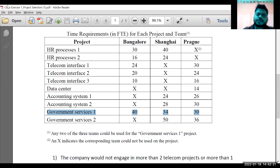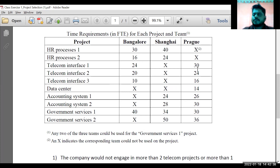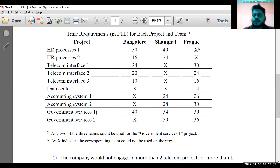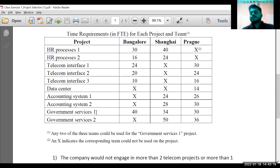The data center is a project where only one team is working — the product team — no other team can work there. Other projects generally have two teams. The comment services project is the only one with three teams listed, but it is written clearly that any two of the three teams could be used. So I can start this project with 40+34, or 34+30, or 30+40 — different combinations. It is not necessary to use all three teams. I can go with Bangalore and Shanghai, Shanghai and Prague, or Prague and Bangalore.